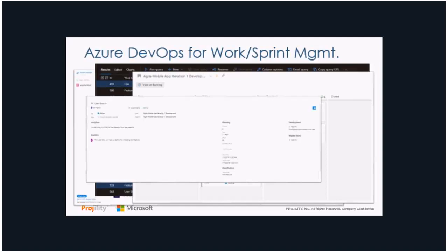So what we want to do is come up with a setup for our DevOps environment that works for your development teams to plan, track, and manage their Agile reporting, and also a way to track actuals in time in the time tracking tool in Project Online and marry those up at the right level of detail. So people aren't hopping back and forth. They're doing all their work in one place and simply doing a progress update in another.